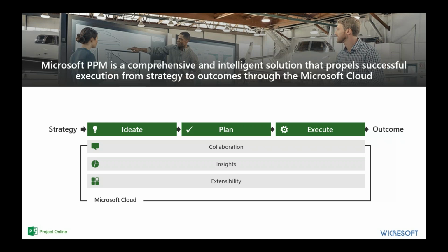So ideate is the initiation phase in which ideas are collected, projects are proposed. The organization's business drivers help to capture the company's strategy and guide ideation. Effectively, why would you deliver this project? Respond to that during the ideation phase.